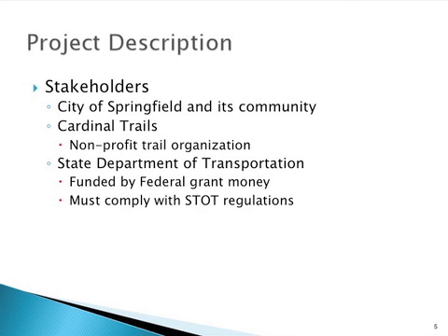The final stakeholder is the State Department of Transportation. They are a stakeholder because the project is 100% funded by federal grant money. This means that the project must comply with all SDOT regulations.